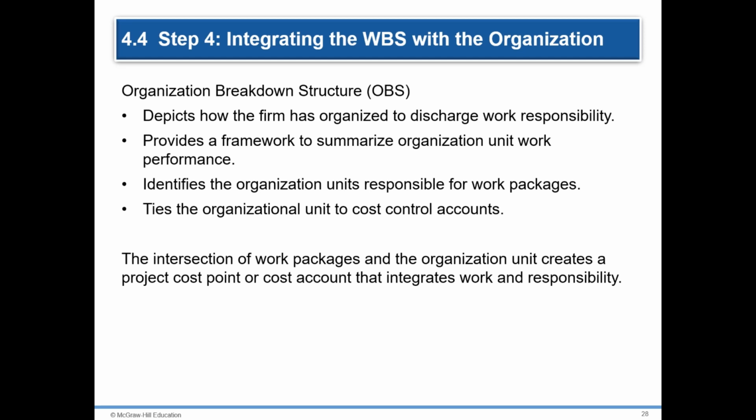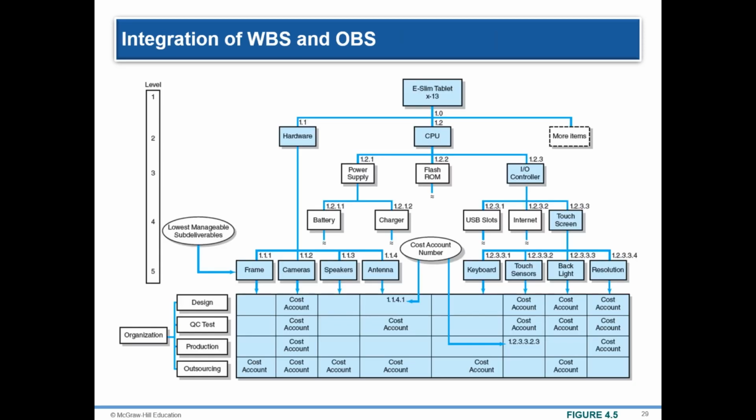So even if the project is completely performed by a team, it is necessary to break down the team structure for assigning responsibility for budgets, time, and technical performance. As in the WBS, the OBS assigns the lowest organizational unit the responsibility for work packages with a cost account. Herein lies one major strength of using WBS and OBS. They can be integrated as shown in this figure.